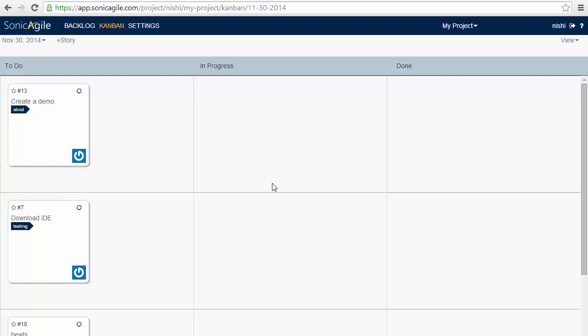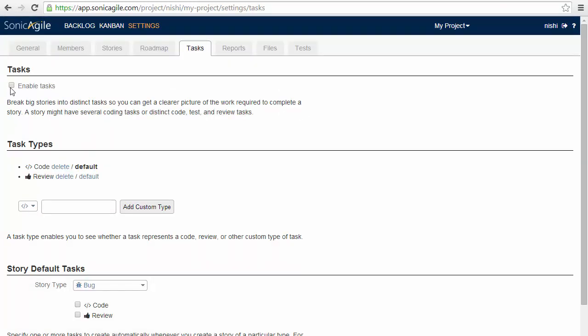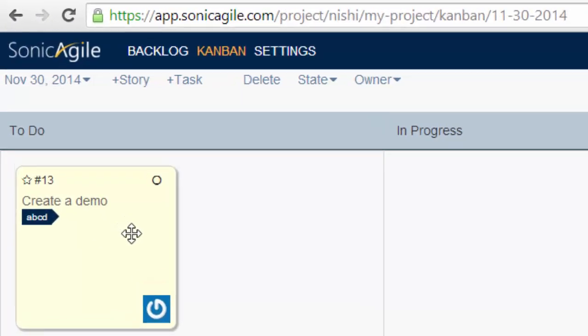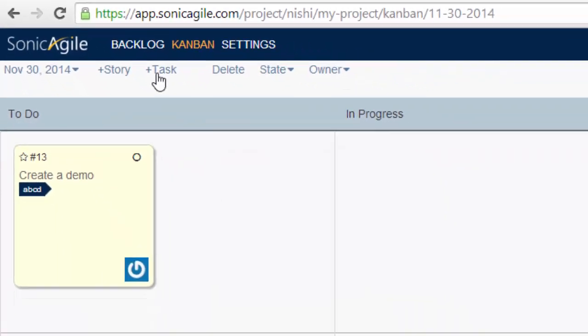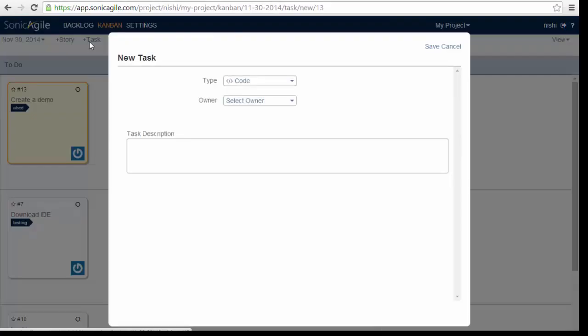Tasks are an optional feature of SonicAgile. You can enable tasks from project settings. After you enable tasks by clicking on enable tasks button, if you go back to your Kanban, you can add a new task to a particular story. By selecting a story and then clicking plus task button, you must select a story on the Kanban before you can add any task to that story.